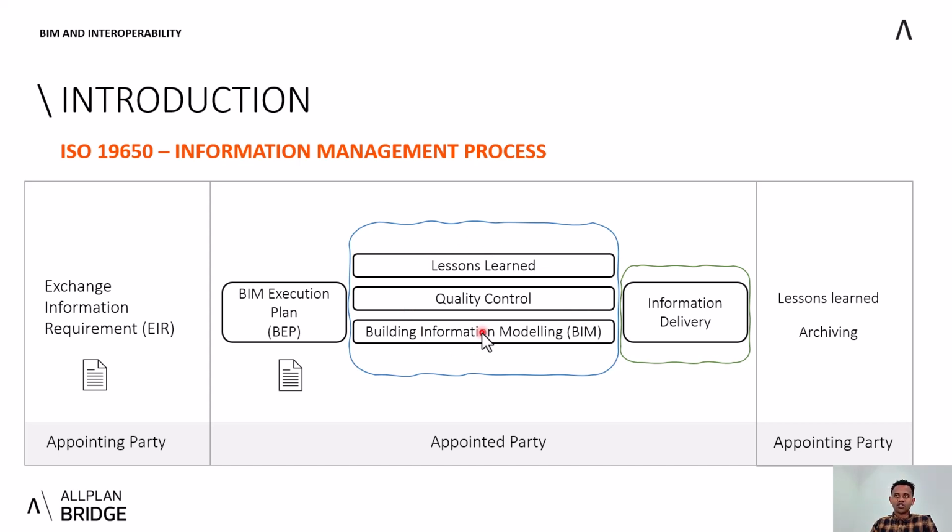Once you model the pier, you have to check that quality, and while checking the quality, you learn or you can draw a lesson. You can say, okay, next time if I have a pier, I should model it this way. Or you could also just save the cross sections that you have used to model a pier. So this is also a lesson that you have drawn from this mini task. So for the modeling part, you can directly do the quality checks or quality assurances, and from that you can directly draw lessons. So this is the first milestone.